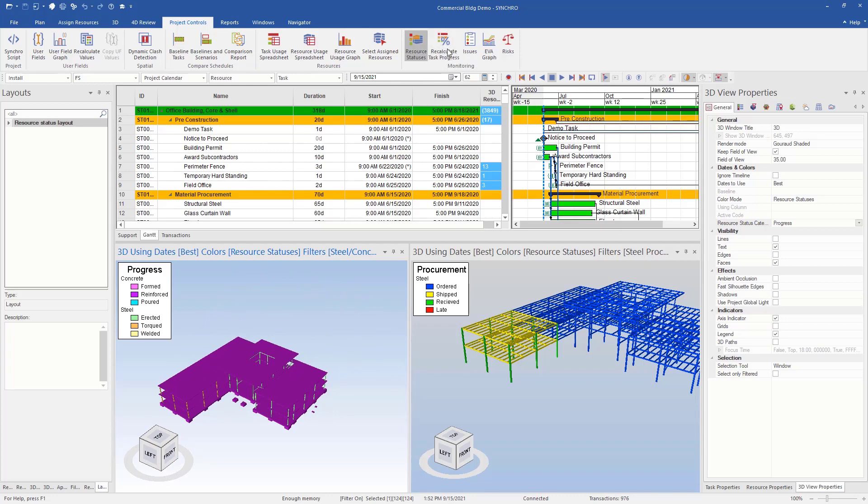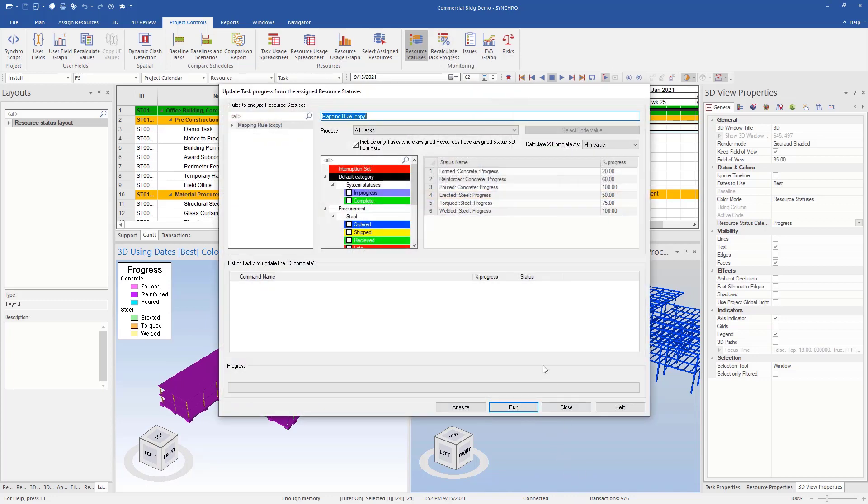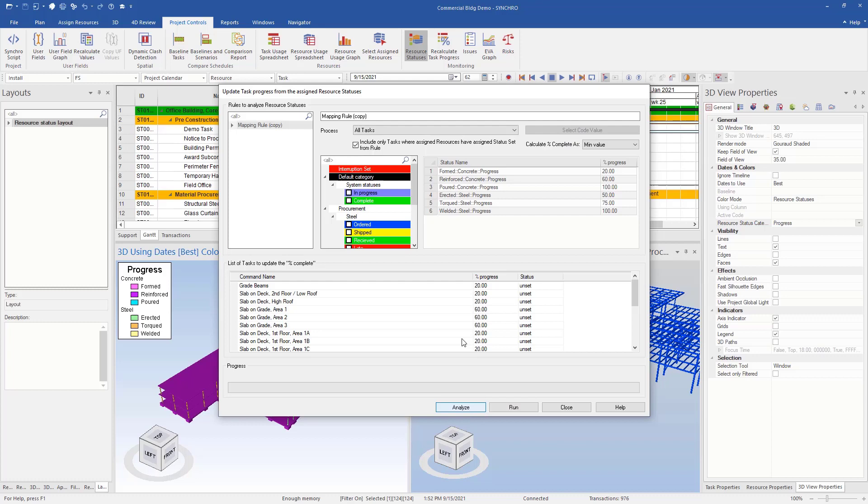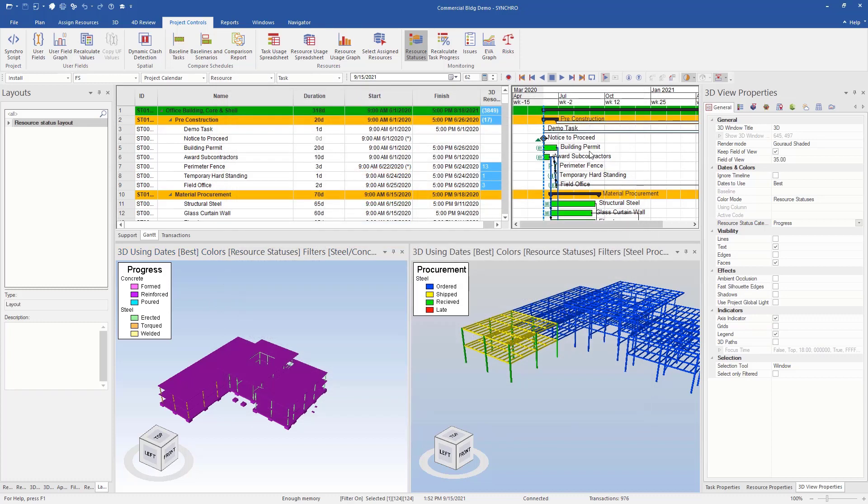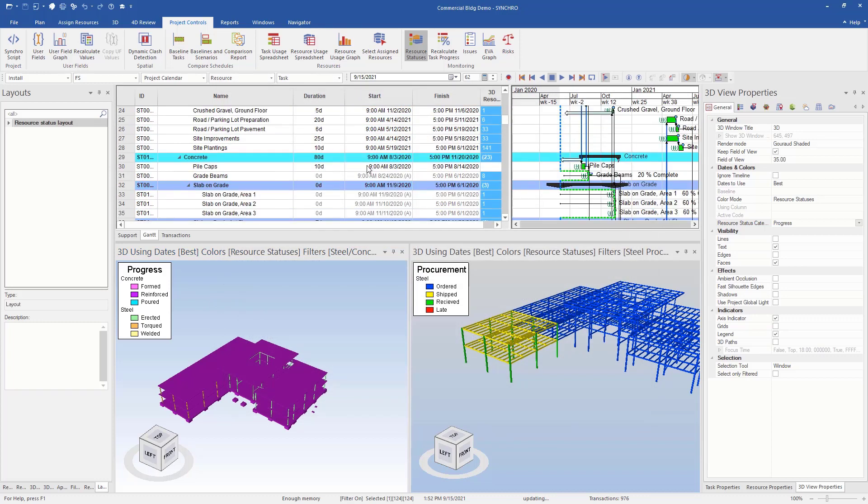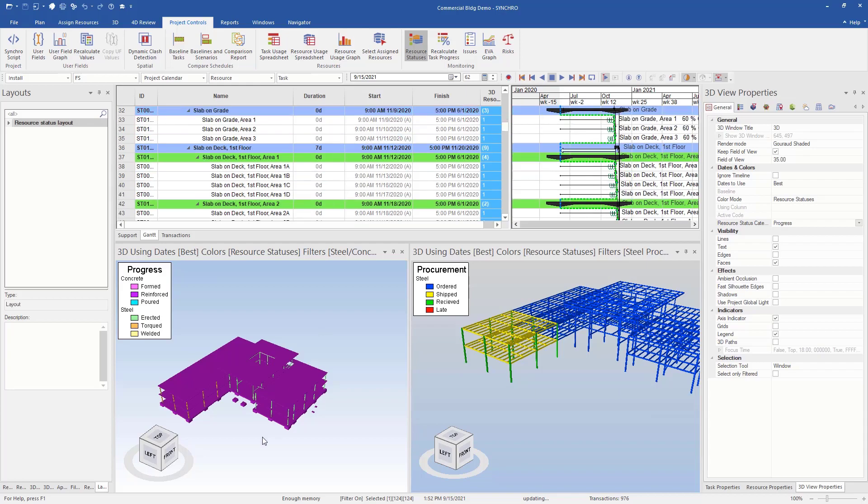And now if we want, we can go and update. We can analyze and run. And now this is updated tasks as per the status. We can evaluate it.